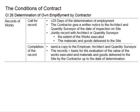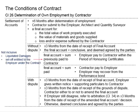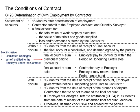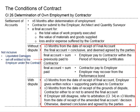There will also be a joint inspection to record the extent of the work executed, as well as the materials and goods delivered to the site. After that, the contractor will need to come up with the final account. This may result in situations where there are disputes or no disputes from the employer's side, and the response in each case differs.